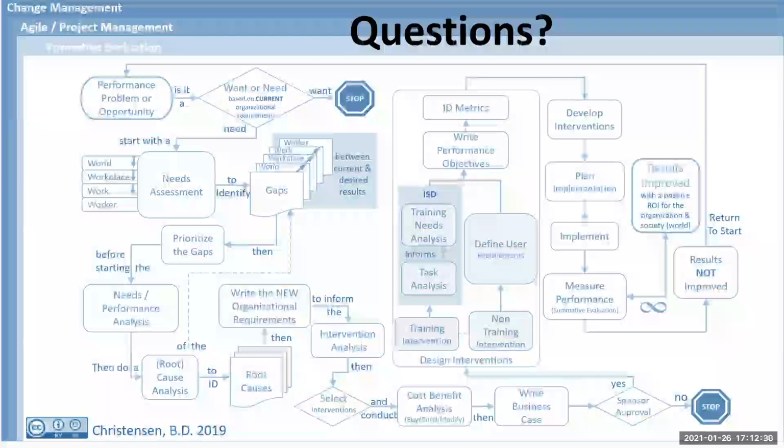And what's really important is that you need to have that up front, and it ought to come out of your needs assessment so that later on, everyone knows what a success story looks like when you're towards the end of any project that follows the needs assessment, and you're trying to determine whether or not you closed the gap. Otherwise you come up with the measures after the project's already over, rather than building it into the project early during the needs assessment.